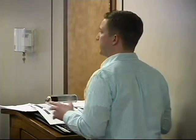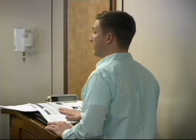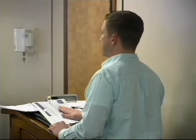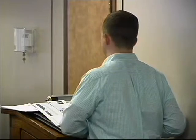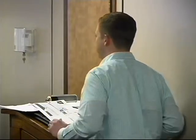So that's where we're targeting some areas that if we have the time to do it, if they're here, we don't have to go out and do a full bid letting process because they're on site and this can be done as a change order, as long as they give us competitive numbers. It seems like the right time to do it. We also went back to them after they gave us our initial numbers, because Bob had indicated that asphalt prices were gonna come down, and he did lower all of his prices on each one of the change orders because the asphalt prices did come down. Completely opposite of the concrete prices this year.